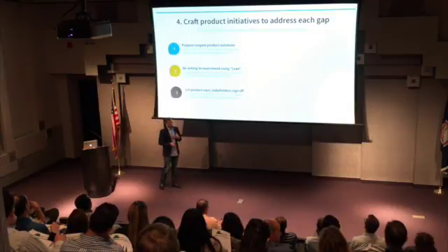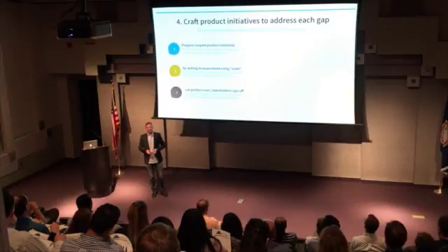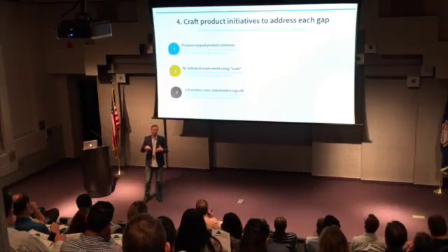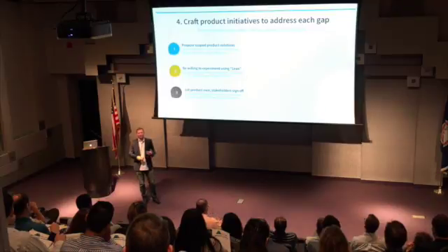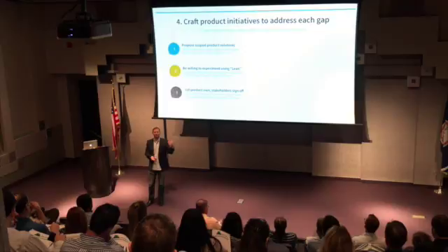And this is the place where you really transition to having the product owner. We talked about the stakeholder owning the grades. They own the problem space, right? They're saying, here are the things that are really important for us for the product. That's great. Rely on them to help you answer that question. But as a product owner, this is where you need to take hold and say, I'm the one who's going to create the solution for solving this problem. At the same time, you also need to make sure that you're running that solution by the stakeholders, because if the stakeholders disagree that your solution will actually address the gap that they've identified, you're going to have a lot of problems later when you try to finish this roadmap and say, hey, here's what we're working on.